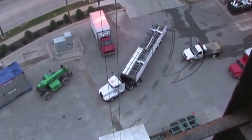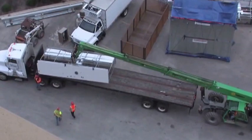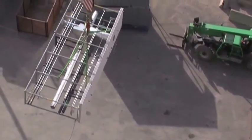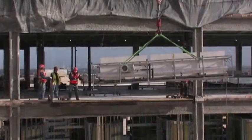It's a lot of material that's not on site. A lot less tripping hazards, safety issues. Things are pre-assembled in the warehouse to eliminate all that. Before anything left the warehouse, we've got pre-test reports for every piece of pipe, for every piece of duct. Great opportunity for quality improvement.